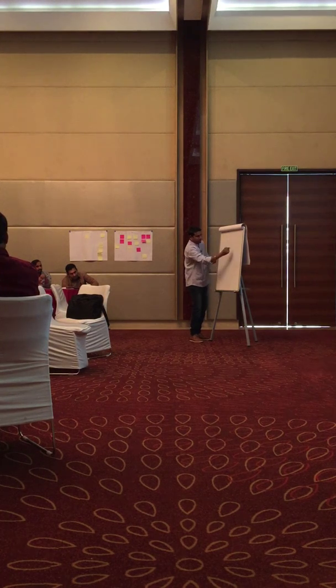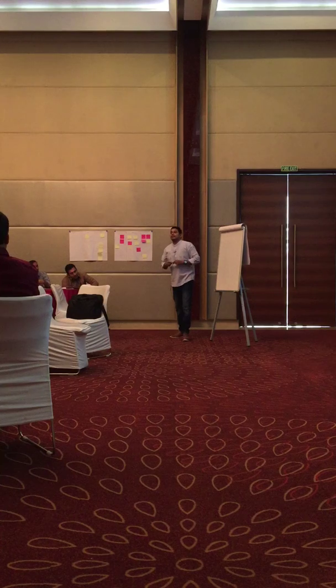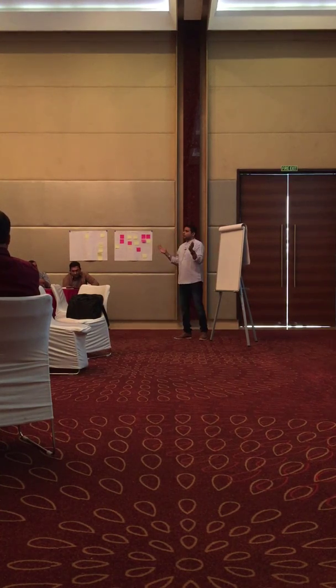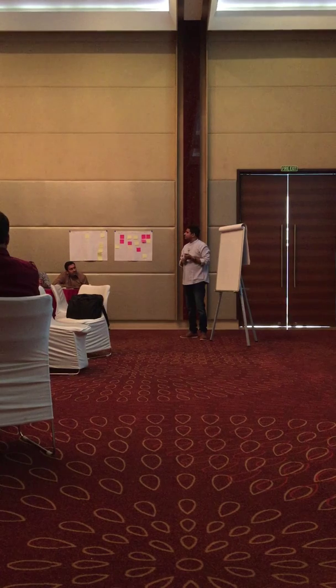Now, what happens? When are you doing this? At what stage of your sprint are you doing this? Sprint planning. Because you know these stories at the end of sprint planning only, right? So together, along with the product owner, the development team makes this chart and they put it on the wall where their development is happening.